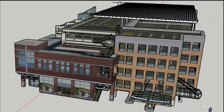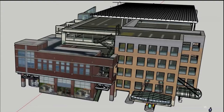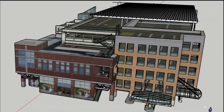This is part of our current portfolio — close to 300 kilowatts on top of one of our parking garages downtown. It's been one of the most challenging projects I've ever worked on, building in downtown Boulder with very high wind loads at 55-foot height. We had to go to council to get a different interpretation of our height ordinance. Building a carport onto an existing structure can be one of the most structurally challenging projects, but it's going to be really awesome when it's done.